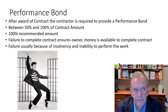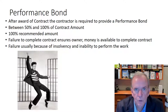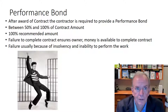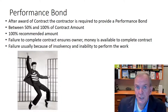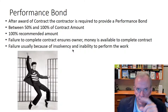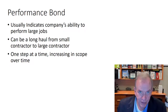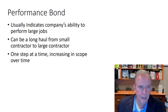A performance bond is typically in the fifty to one hundred percent range of the project value. If you bid a project at one billion dollars and can't complete it, up to a billion dollars of completion cost is what you're covered for. If you did 200 million dollars of work on a billion dollar bond and it costs two billion to finish because you were drastically underpriced, the bond only covers up to the bond amount. The client still would have had to pay out that billion dollars to build it — it's just the extra over that amount that's covered.